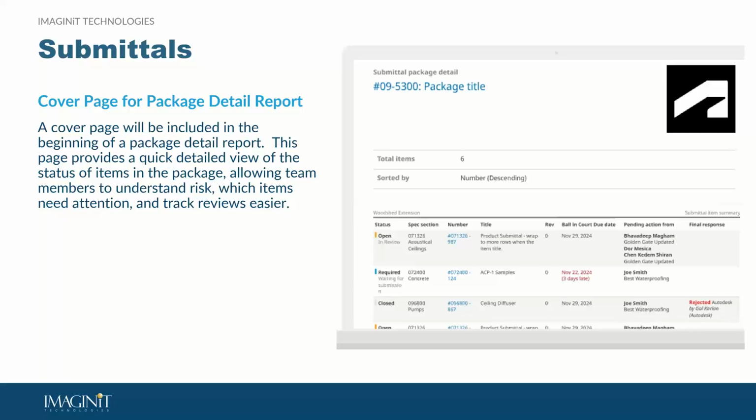So this is a really large improvement for anyone that's managing dozens or hundreds of submittals at once, specifically for different personas. So for our project managers, it means that they can glance at the cover page and immediately know whether a package is ready for review, or if it's partially complete, or maybe if it's at risk. For our design reviewers, it can help them prioritize which packages to focus on quickly based on those statuses and deadlines. And for owners and other project stakeholders, it can give a quick professional summary without requiring them to look through the entirety of that submittal package.